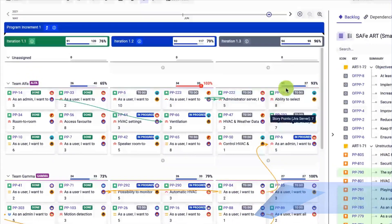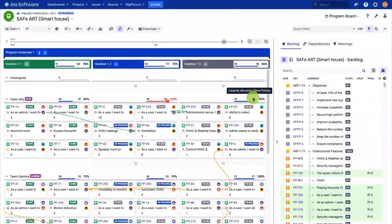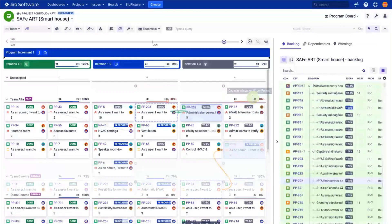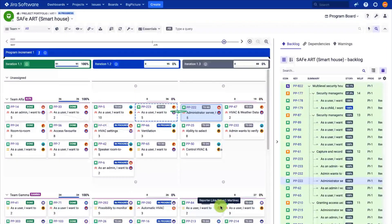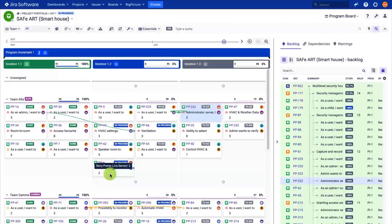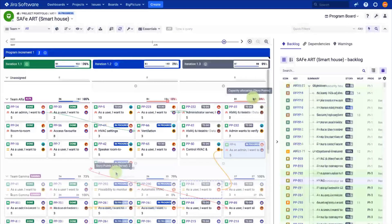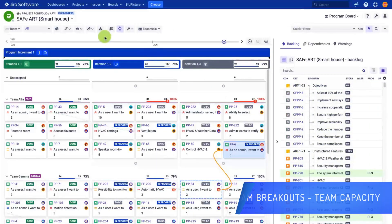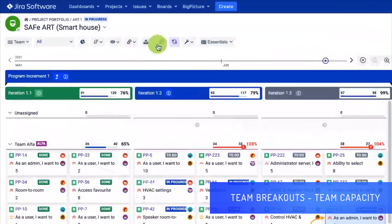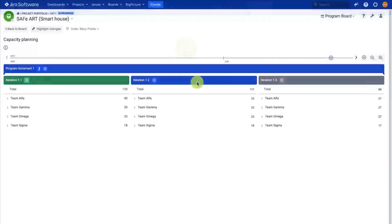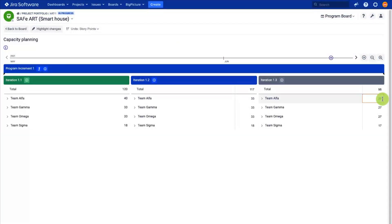Next, estimate the story points and define the dependencies. There are up to five link types which you can visualize. The links synced to JIRA bi-directionally. Watch the dependency tutorial for more details. To estimate the team capacity, go to the capacity screen and set the capacity for each of the teams and iterations.